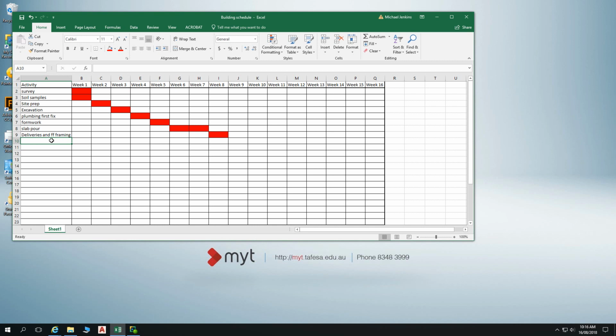I'd say you combine all the roof framing and the wall framing in at one stage. For a lot of the standard builds that have a decent team of carpenters, they might throw up a frame in one day, but if not, they'll definitely get it done by lunchtime of the second day, for a very standard sort of place. But in our area, it's very common that the roof goes on, basically because of the weather. So even though the house is a long way from finished, they put the roof on pretty quick.